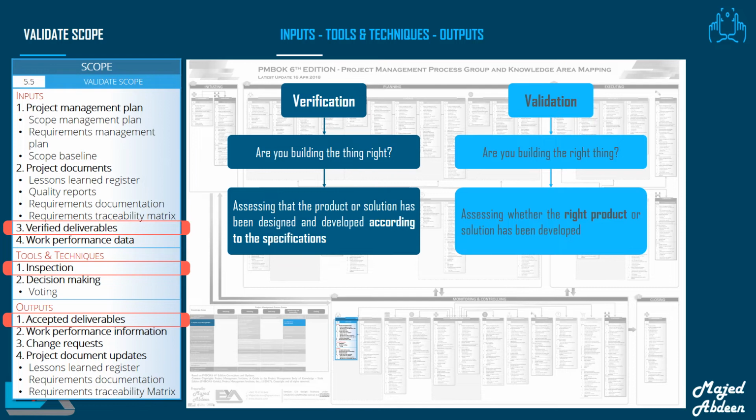If we have any change request or improvements related to the deliverables, they may be changed, inspected, or re-verified during control quality. It's more important that we conduct both verification and validation activities throughout the project. You can perform inspections as deliverables are completed at phase gates or at milestones. This reduces the risk that you will get the finished product and the customer will say, "This is not what I was wanting at all."